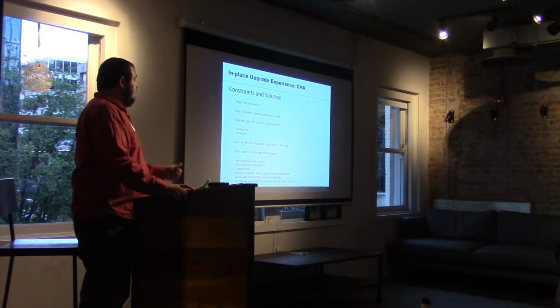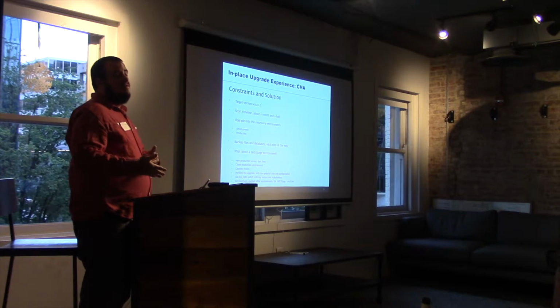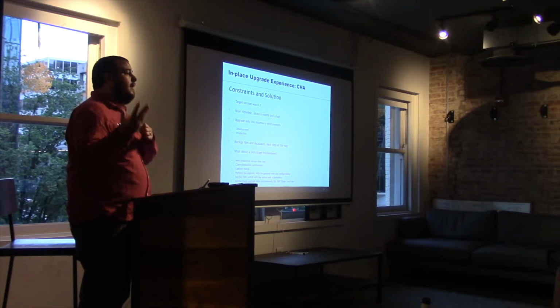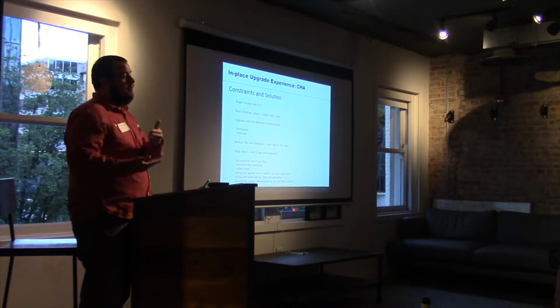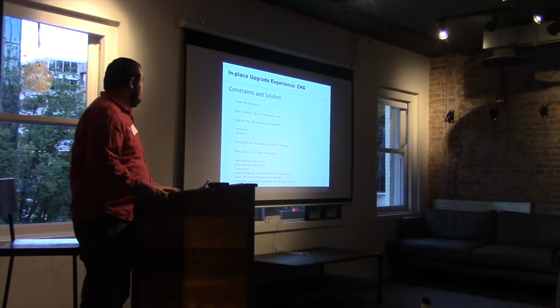Backup files and databases each step of the way. This is part of the solution. You want to make sure that you're taking snapshots of your upgrade so that just in case something happens in the next upgrade, you can go back to a previous version and re-perform those upgrade steps, making sure that you're not losing track of your changes.